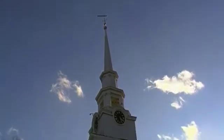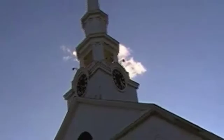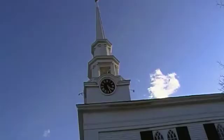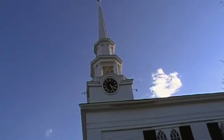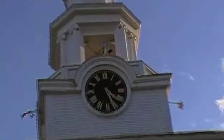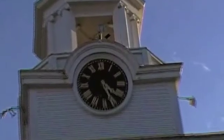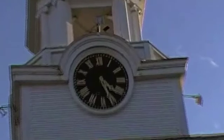The face of the clocks on all four sides are going to be changed from pine to cedar for longevity, and the Historical Commission was probably going to mandate that anyway. We put it in at $18,000, which will be the full responsibility of the town since they own the clock face. If they choose to go back down to plywood, there'll be a deduct of $10,000 of that.